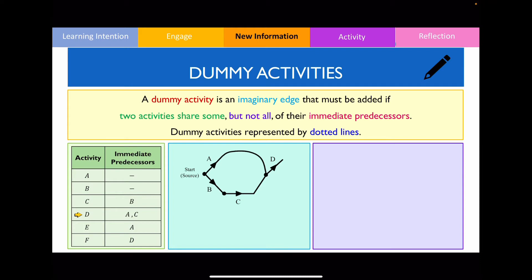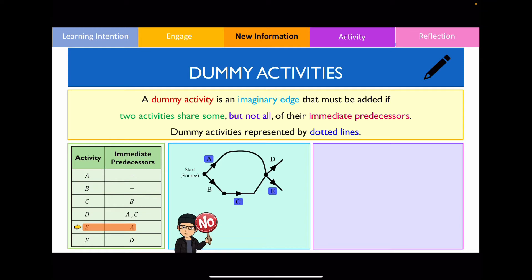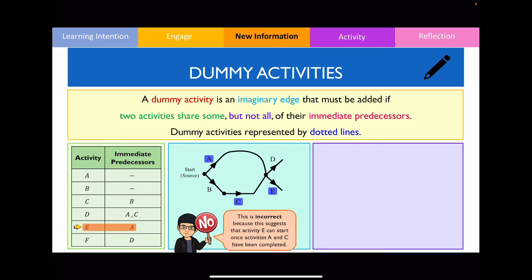Now, when drawing an activity network we prefer straight lines over curved lines, but let's ignore that for now to demonstrate why a dummy activity is necessary. For activity E, the table says I need to have completed activity A in advance. You might think to draw an edge from the vertex where A and C converge, but this is actually incorrect — because that vertex signifies completion of both A and C, whereas the precedence table clearly states that activity A is the only predecessor for activity E.